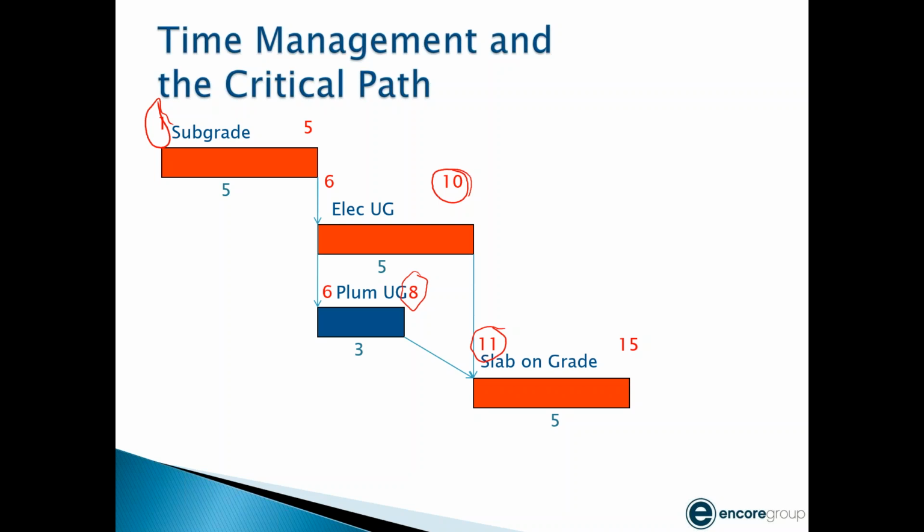That's what a scheduling software is doing. It's counting through from the beginning, based on the calendars, all the way up through the end of that logical sequence of those activities. And then what it'll do is calculate backwards. If it's a good scheduling package, it does what they call a backward pass. It starts at the end here on day 15 and works its way back to day 11, right? These are called late dates. The forward pass, when it counted forward, was early dates. Counting backwards is late dates.